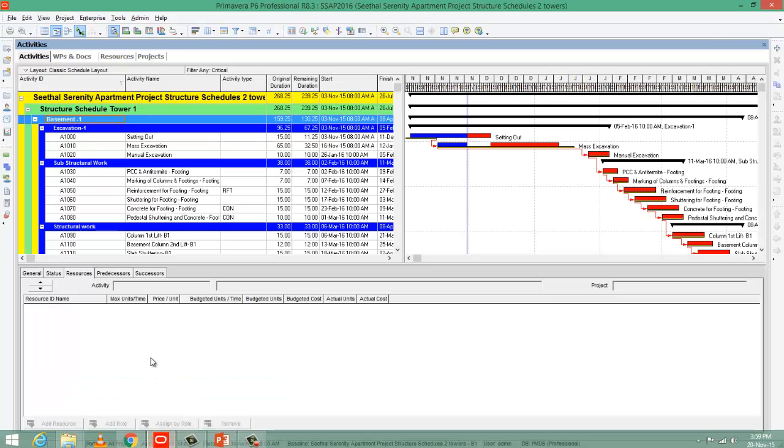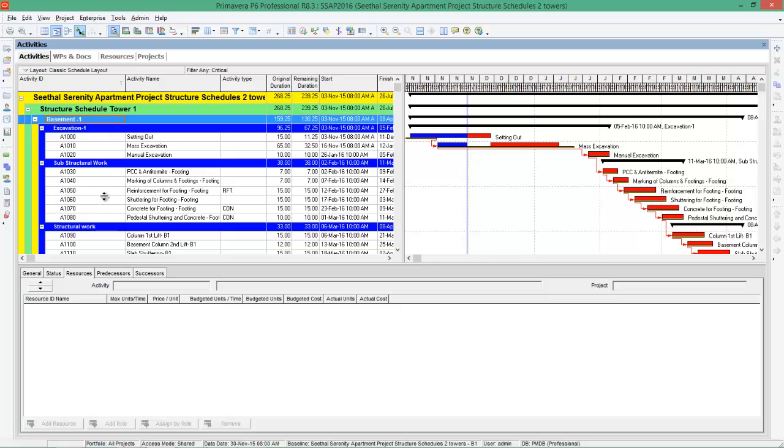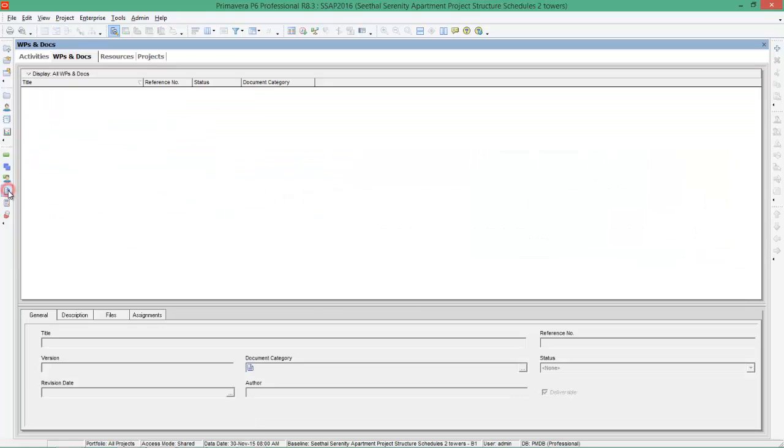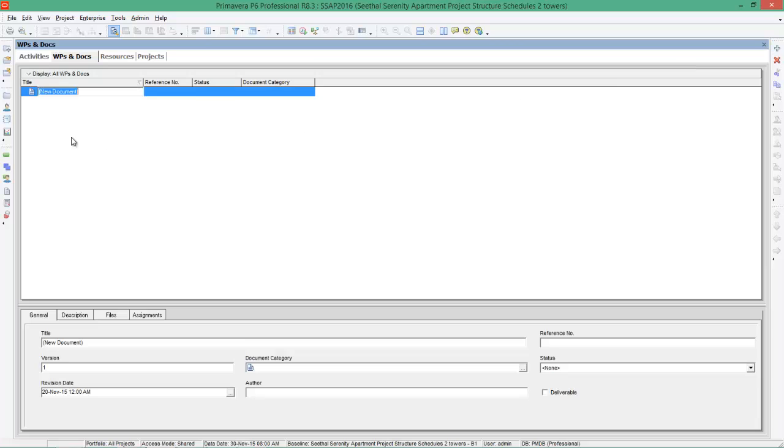Open Primavera. In Primavera there is an option called work products and documents. Go to work products and documents and you can add a file and name it preliminaries and press enter.